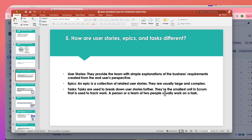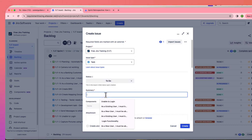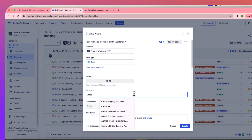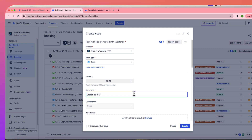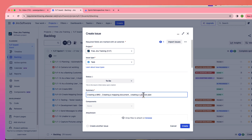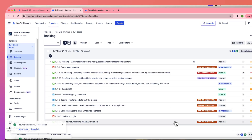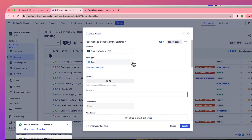An epic is a very high-level, large, and complex requirement. Tasks are used to break down user stories — they are the smallest unit in the scrum framework, typically completed by one or two people within three to four hours maximum. Examples of tasks include: creating a BRD, creating a mapping document, or creating a UAT test plan.